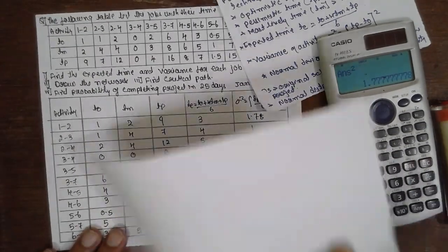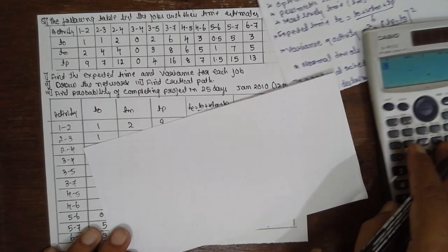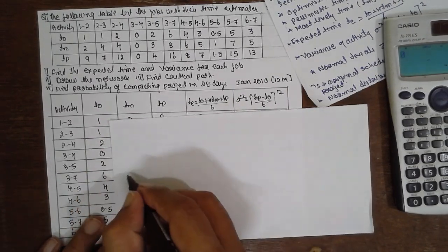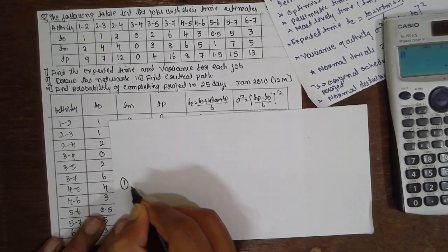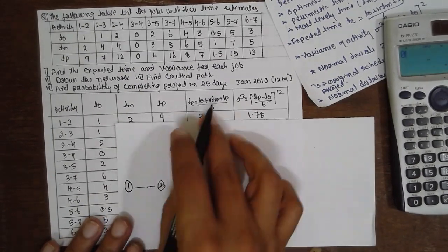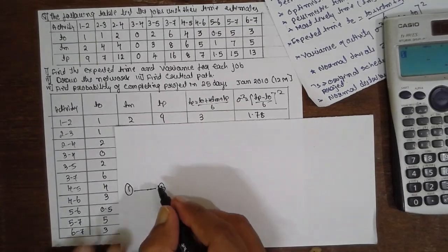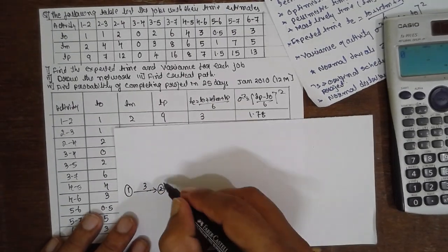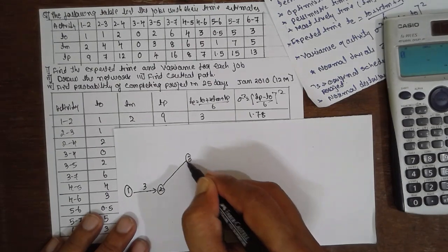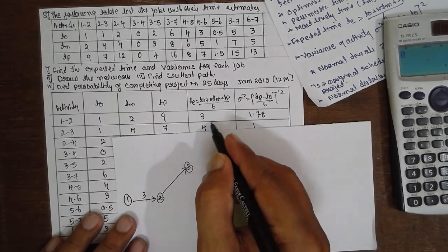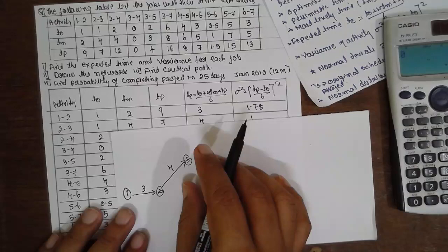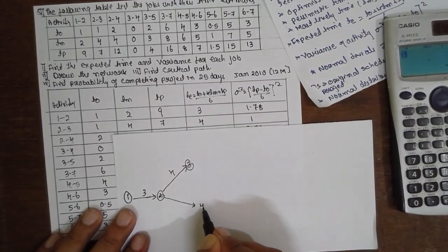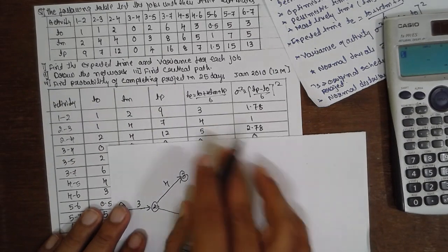Let us draw the network diagram here. 1 and 2. What is TE value? TE value is 3 here. 1 and 2 is 3. Next, 2-3. 2-3, it is 4. Next, 2-4. 2-4, the value is 5.